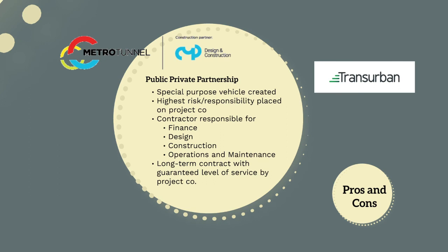In this way, the client, typically government bodies, as PPPs are generally only used for massive multi-billion-dollar projects, simply has to pay the consortium a fixed annuity over the project life, typically 25 years, and all the risk and responsibility is on the consortium. This means the consortium will need to organise the financing of the project, take the concept design and construct it in the most effective way, while also minimising the whole-of-life operations and maintenance cost.